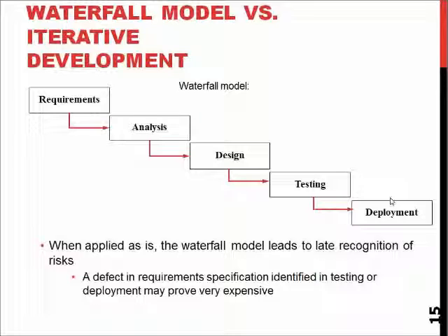So, not only is this pushing the phase when we are doing testing work, or actually seeing that everything functions correctly, to a really late stage, it also means that if you are running over budget or over time, you are cutting out your test cycles.